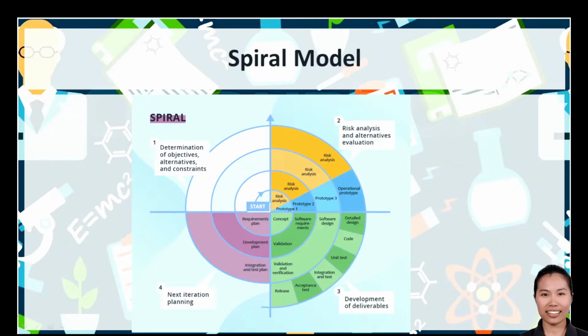So, this model puts focus on thorough risk assessment. Thus, to reap the benefits of the model to the fullest, you'll need to engage people with a strong background in risk evaluation. A typical spiral iteration lasts around 6 months and starts with 4 important activities: thorough planning, risk analysis, prototypes creation, and evaluation of the previously delivered part. Repeated spiral cycles seriously extend project timeframes.